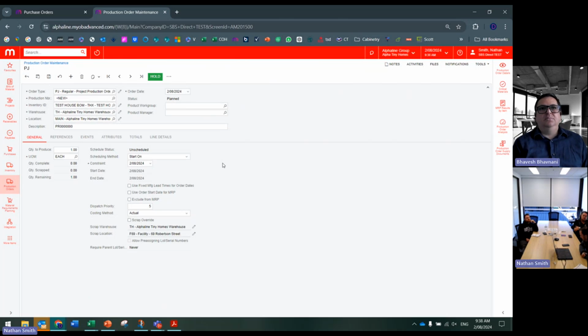It's about 5 to 7 days, so that's 1 week. So if I purchase order today, I can get it in the next 7 days. That means I can start working on this production order in 7 or 10 days. So my start date would be minimum 15th August, right? Or 10th August, whatever. 7 days from now, yeah. 7 working days, yes. So that's what I would do. That's how I have to plan.